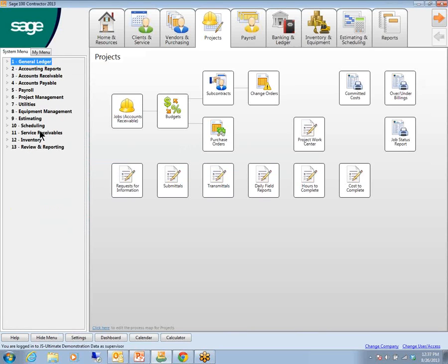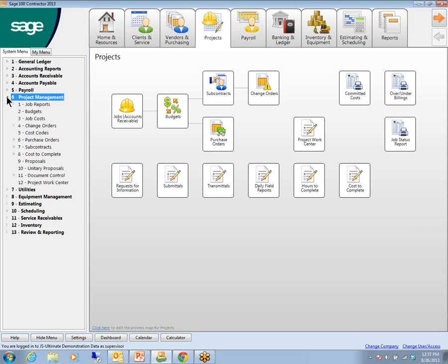Last thing, I know there's been some interest around confirming how a job was handled, whether it's the spend on the job or the contractor on the job. Let's talk a little bit about how we manage our contractors on the jobs. Well, we do that through a couple of different purchasing instruments. It's either through a PO or a subcontract. Both of these are called committed costs.